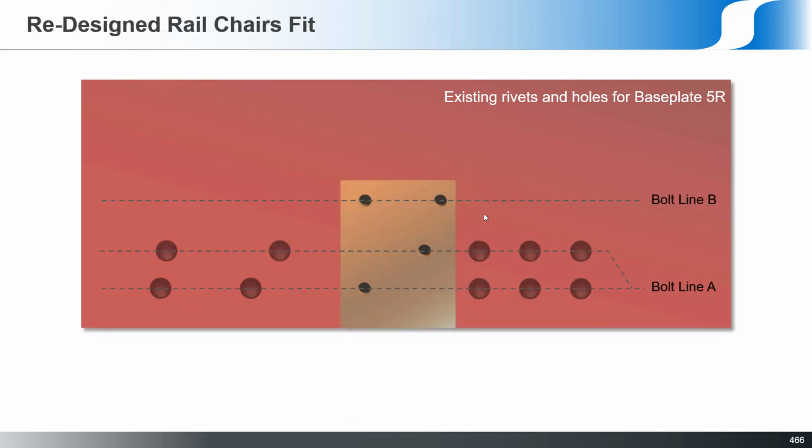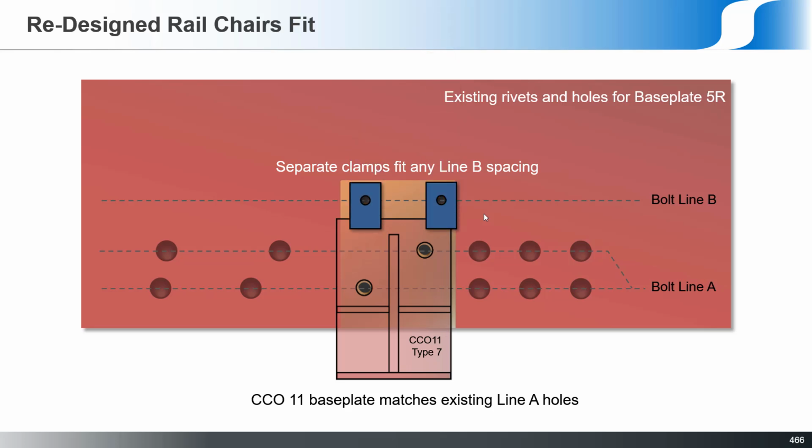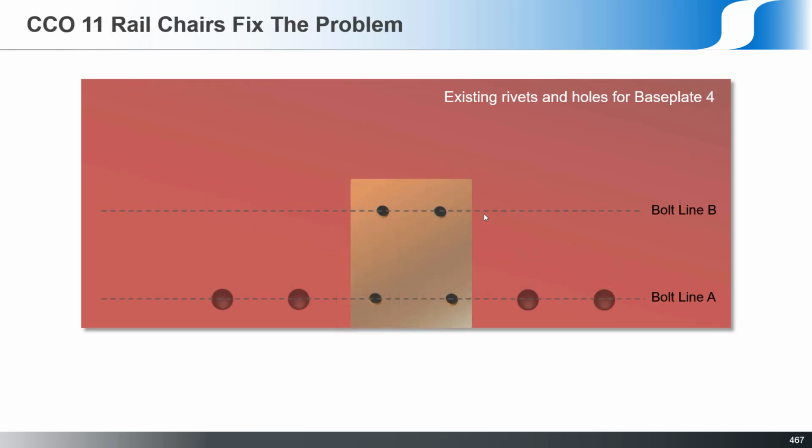After a period of time, once the owners redesigned that base plate, they came up with a variety of plates that would match any bolt pattern on the bridge. So the plate was a little different shape, had a couple different holes, and then they used clamps on the back to hold it down. So that gave a better fit, but it took time to redesign that. And of course, our guys had to then go back and install that.